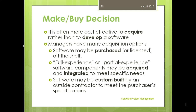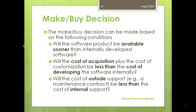Make-or-buy decision: it is often more cost-effective to acquire rather than to develop software. Managers have many acquisition options — software may be purchased or licensed off the shelf, fully experienced or partially experienced, and software components may be acquired and integrated to meet specific needs. The make-or-buy decision can be made based on: whether the software product will be available sooner than internally developed software; whether the cost of acquisition plus customization will be less than the cost of developing internally; and whether the cost of outside support, such as a maintenance contract, will be less than the cost of internal support.